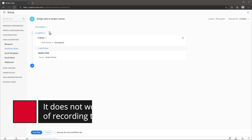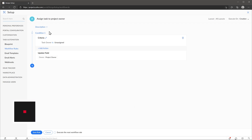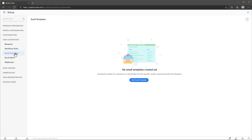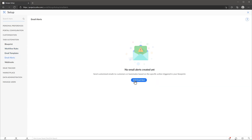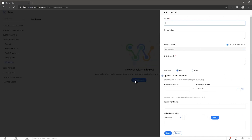Unfortunately, at this time this feature doesn't work with templates, meaning that even if the tasks created by a template match the criteria, they won't trigger the workflow. It only works if you manually add a task. Another automation feature is that you can create email templates and email alerts to notify people about changes in the tasks. These only work with blueprints. Finally, you can create webhooks to push information to third-party apps.